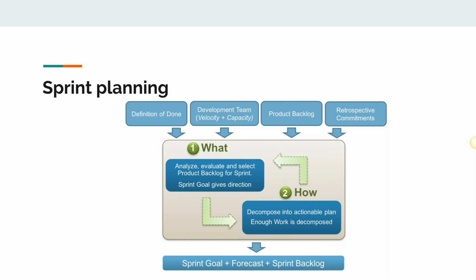They can't do some other work because that is not their sprint goal. For example, they can't be doing something like login, or some barcode reading work, or maybe even Alexa work or something like that, because their sprint goal has already been set. So within that scope of the sprint goal, they can take any work and do it.